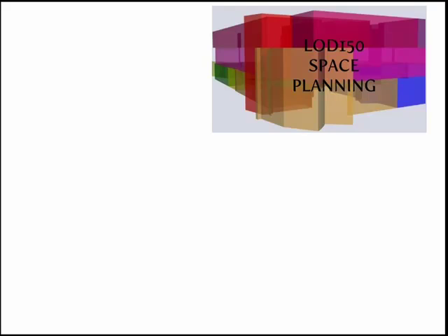Now this is where we are at program information. Typically we get program information from an owner early on, and there's no design. There may not even be a footprint. You can create zone elements broken out by specific space identification: common areas, lobby area, hotel room, operating room.